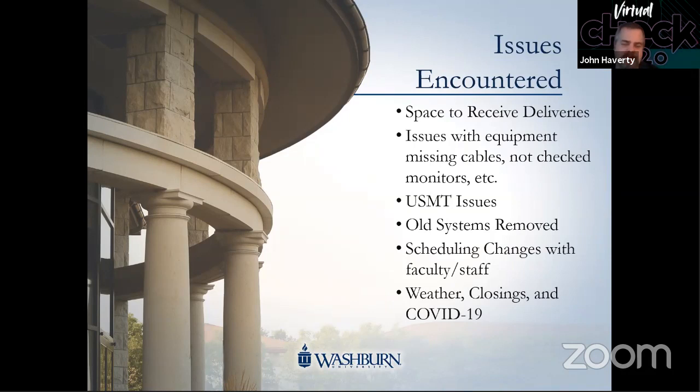Maybe actually a correction, I think it was October, and then the September delivery, there were some problems with warehousing with the delivery, and that got really delayed. We didn't get it until the following month. So it was just working with our vendor, trying to figure out what the delay was and getting that corrected. But space was always an issue, trying to find where to store the new systems, where to keep the old systems while they're staged to take down to be recycled or put in the bin for reimbursement, that type of thing. So that was an ongoing issue.